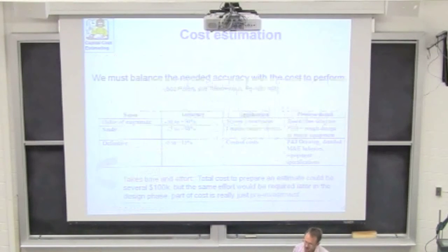So we're going to look at some very quick ways of judging the costs. Order of magnitude, that is really just to screen investments. So when we're saying an order of magnitude, we know that there's huge error. We could be out by a substantial amount, but essentially this is simply choosing between alternatives. Do you go with one type of flow sheet that's got a reactor and two separators, or do you go with a newer technology that's just emerging, that's supplied by a particular company, a third party? Choosing between an entire technology.